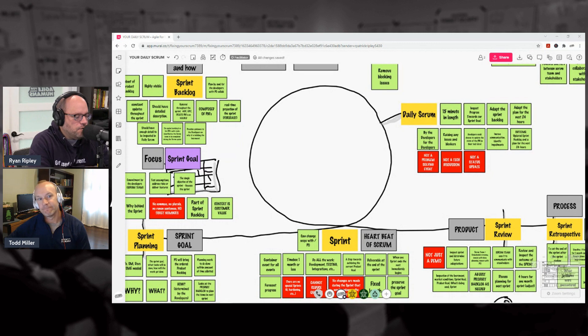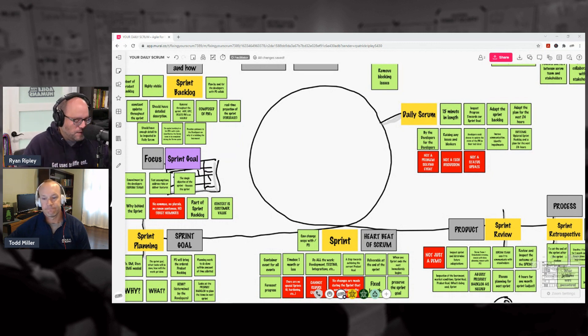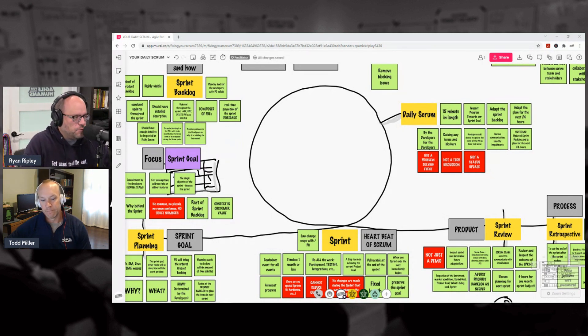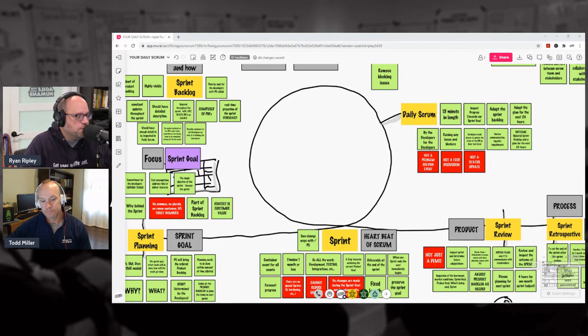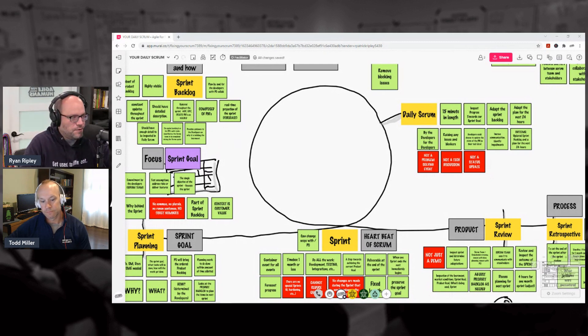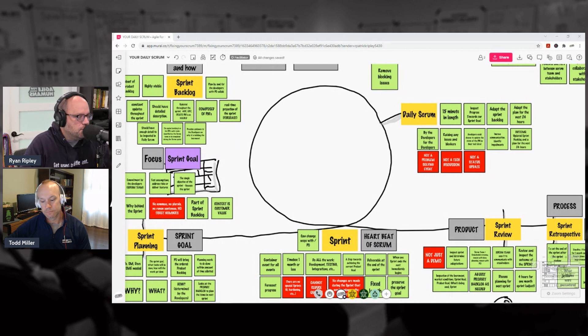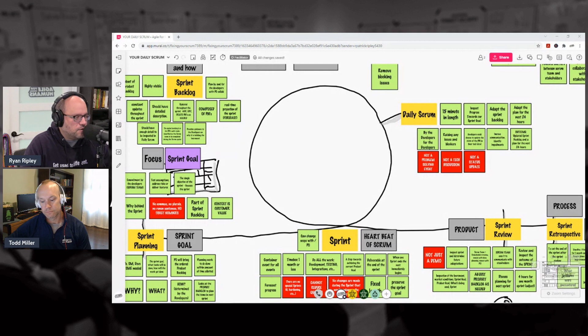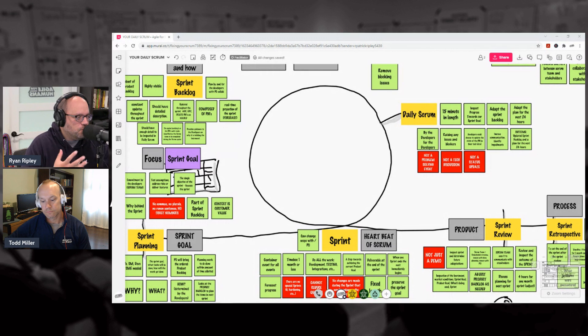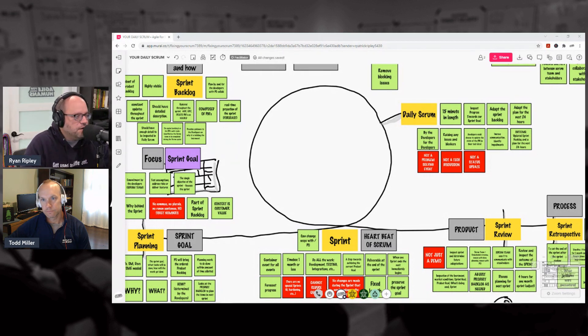When we think about that next one beginning, the beginning of a Sprint, that's when Sprint Planning occurs. This is when a Scrum team gets together and they look at the product backlog, they check out the product goal, they start crafting a sprint goal, and they start pulling work into a sprint backlog. They pull PBIs, product backlog items, into a sprint backlog that hopefully will help achieve a sprint goal that ultimately helps achieve a product goal.